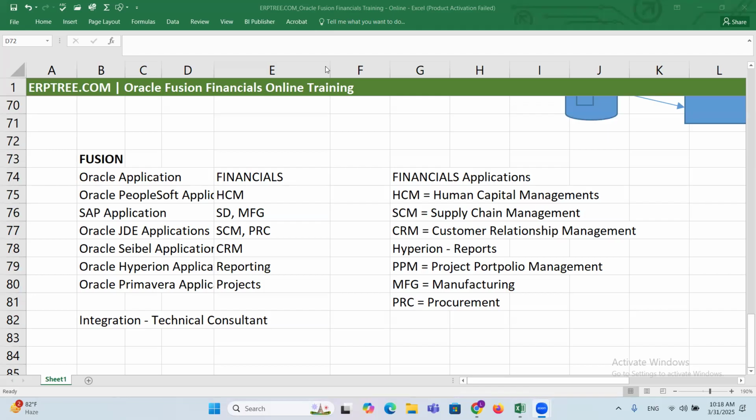These many reports, if you want us to modify as per your business requirement, yes, we will do it. Say throughout the entire finance, 50 reports our technical team can help you with by modifying as per our requirement. Even if Oracle is providing them, you may need some changes, adding your logo, colors, fonts, formats, right? We can do this for you, but there is a scope. 50 reports or 20 only. More than that, extra efforts are required, and that will cost.